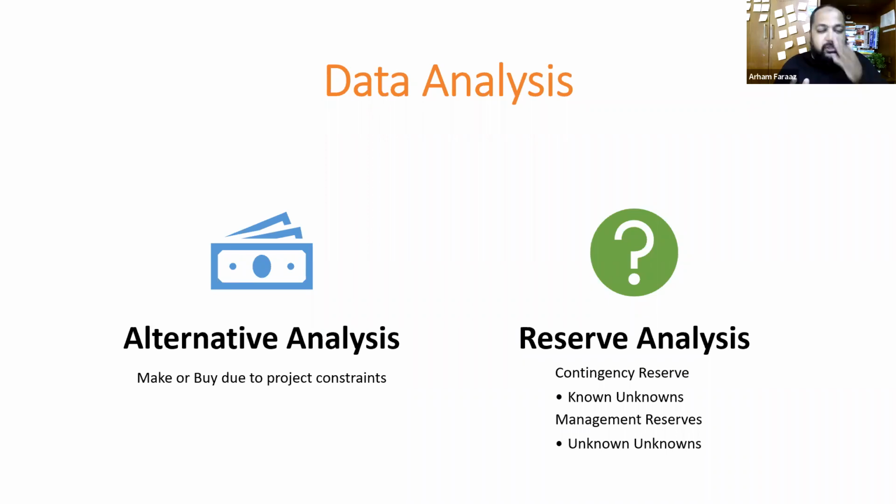Then reserve analysis. As a project manager, we need to work on this because there are two types of reserves. For the examination, please remember this, Rakhi. One is called contingency reserve, which is a part of your scope baseline or cost baseline. Contingency reserves are always a part of the baselines. This is a known unknown: you expect some issues can happen, so you have some reserve for that, like an extra 2 weeks of buffer. For example, as I told you about the rains or the festival holidays, these are known unknowns, right? So these are all part of your baseline.